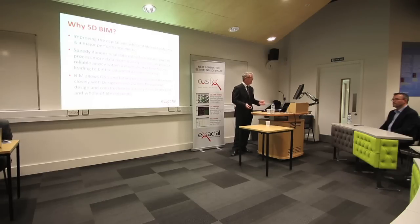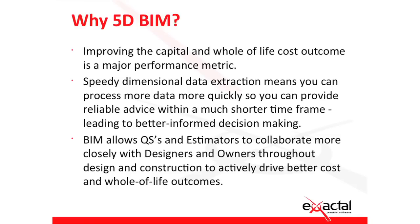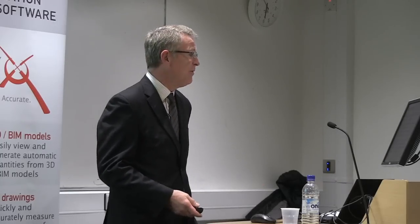Why is BIM of interest to quantity surveyors and estimators? Improving cost outcomes is a major performance metric for any project. Speedy data extraction enables you to process more data more quickly, provide better advice, and feed back to the design team much faster. That traditional lag — waiting to receive drawings, measuring them up, doing analysis, only to find they've moved on — is eliminated. You can virtually talk to them in real time, run comparative options almost straight away, and really actively collaborate and contribute to design development in a way that wasn't possible before.